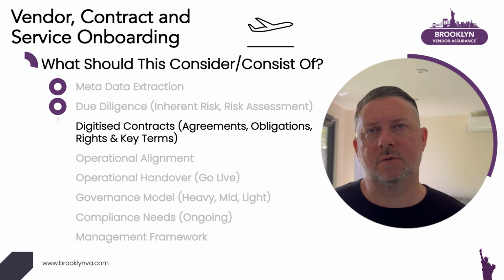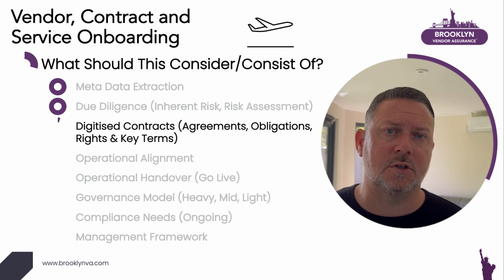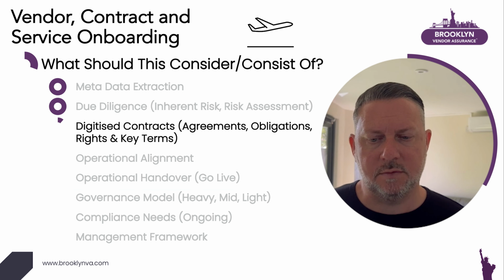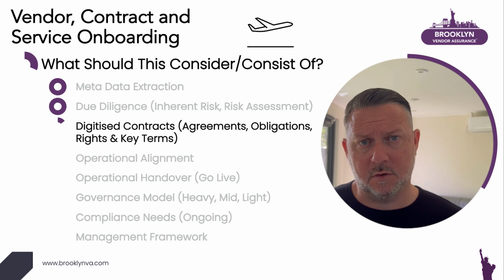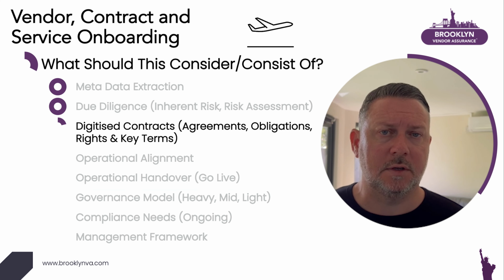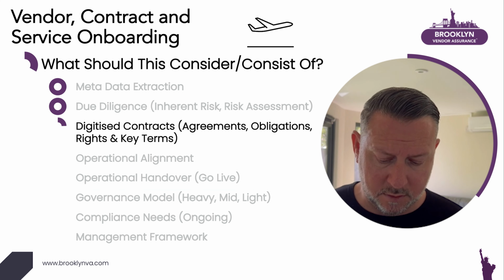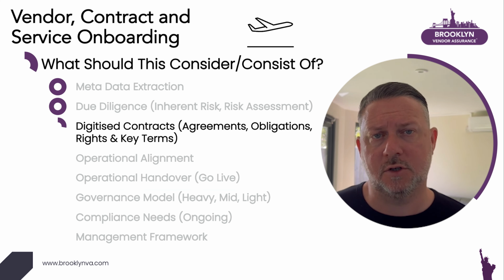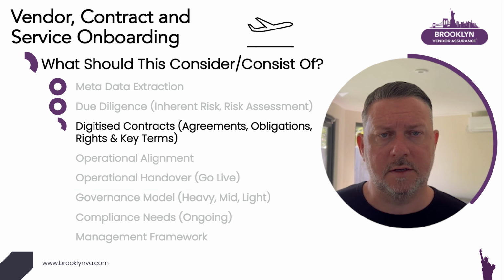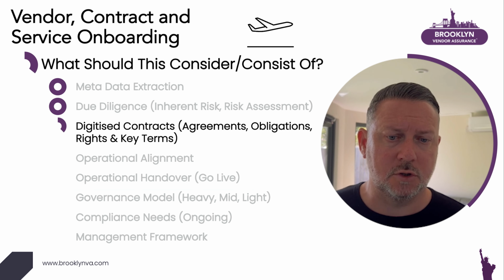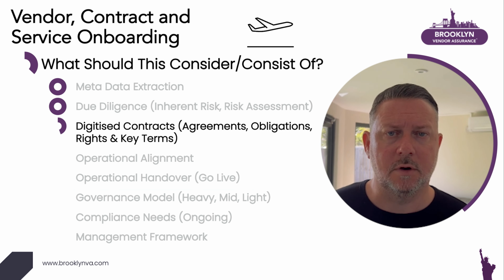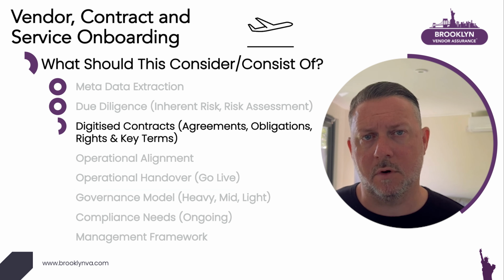Which leads on to the contract, or digitizing the contract, digitizing the agreement. You'll have a multi-page agreement with a supplier that details information like terms and obligations. Where it says supplier shall, buyer shall, you both shall, those things need to be extracted along with the detail that either turns it into a data trigger condition or a timing condition over a certain period to say what each party should do. They need to be structured in the right manner to ensure that they are clear in what they're asking to do, that they're time bound, that they're agreed and achievable, and that they're being assessed by the right people that are going to do it.